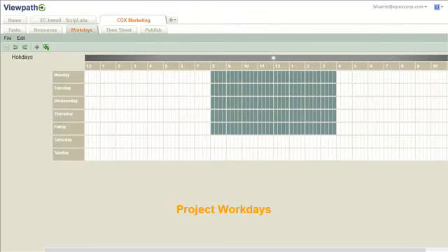To modify the base schedule of workdays, select the Workdays tab. The default schedule is shown with green cells. Tailor the workdays by adding or subtracting cells. For example, simply click these cells to remove actual work hours from 9 to 10:30 a.m. because of a team meeting every Monday morning. The system then automatically skips this time on Mondays when scheduling work assignments. Paid users can also add holidays to the project's work schedule.